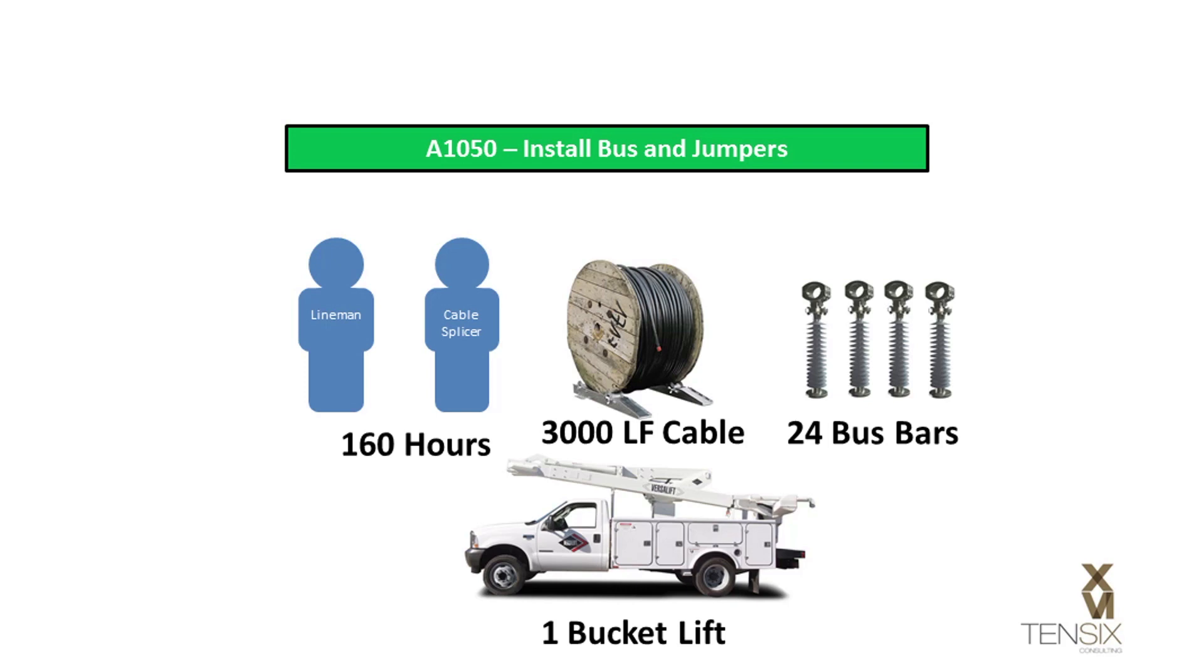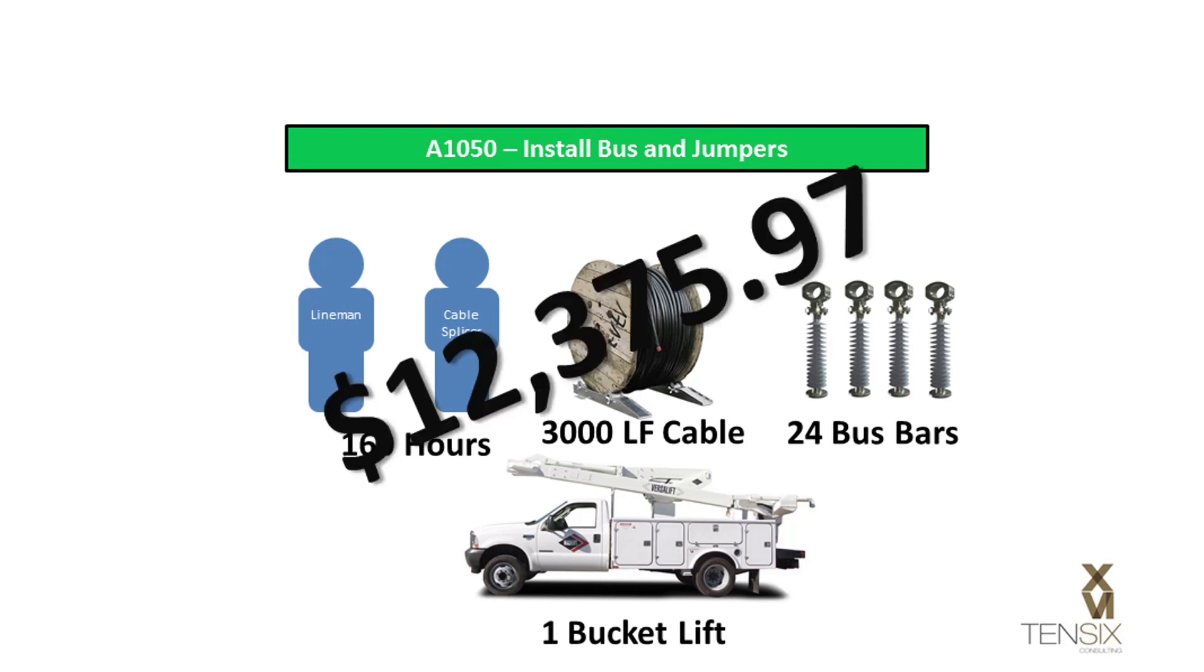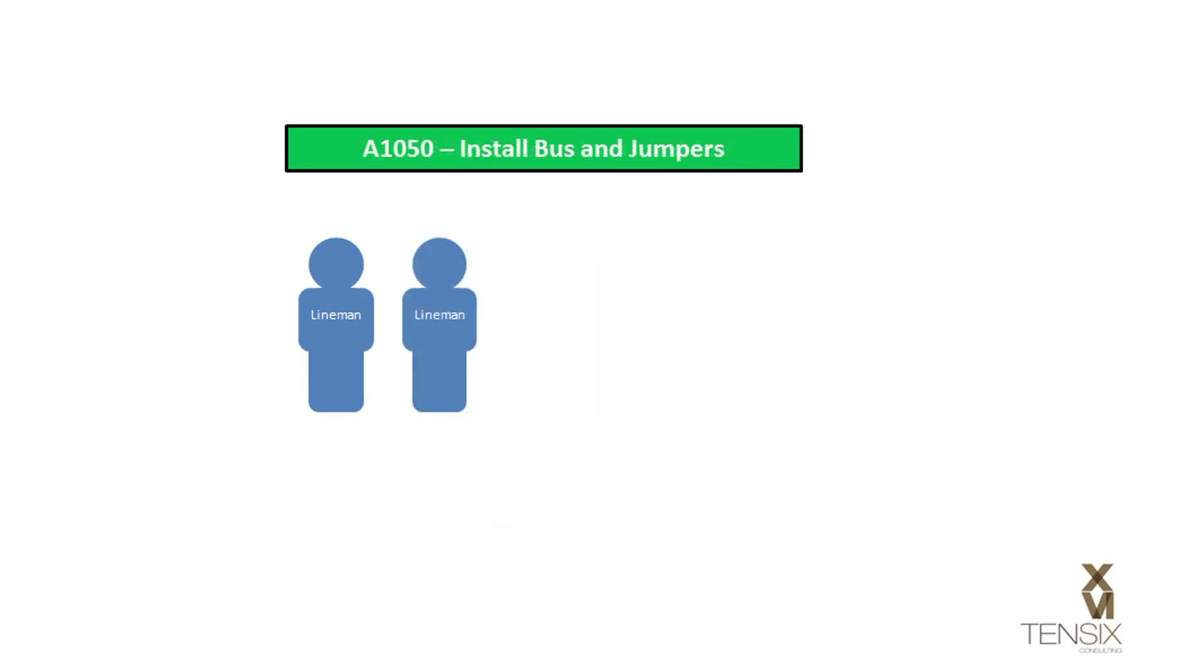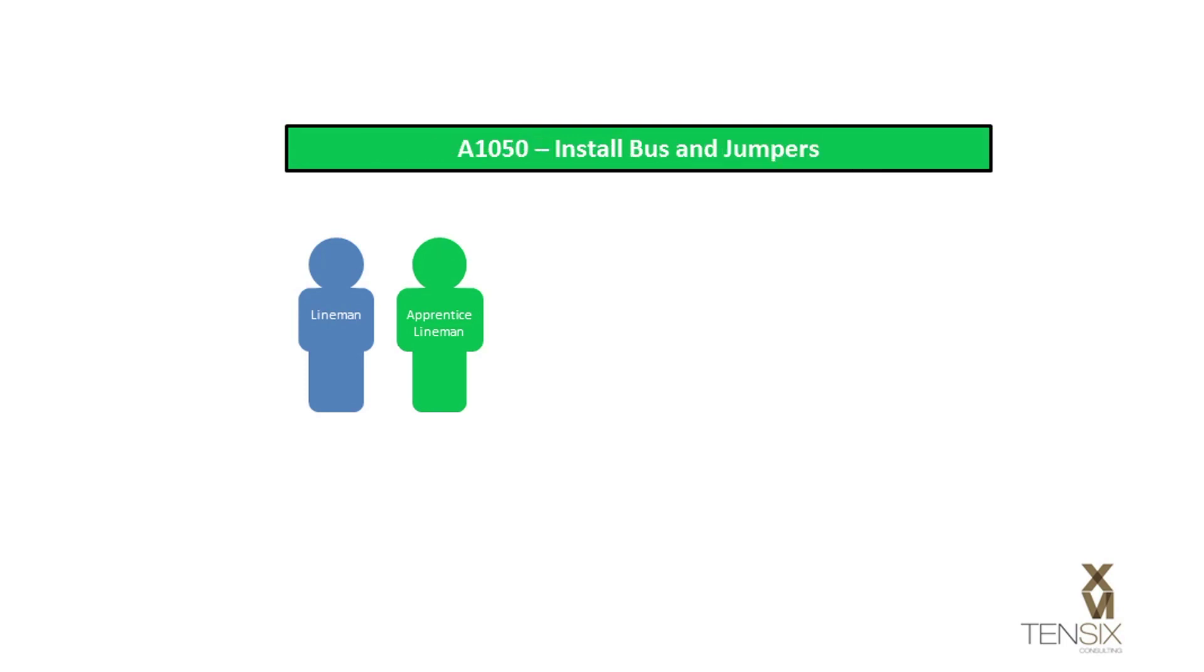In Primavera, resource assignments can assist the project manager in assessing the planned cost of the work. The quality and availability of resources will also influence when certain work can happen and how long it will take. Therefore, a particular resource's skill level and availability will have an impact on the activity duration and ultimately the critical path.